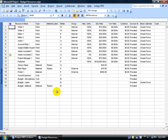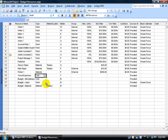Up until this point, we've only assigned cost to our work and material resources here in the Resource Sheet view, and you can see that in the Standard Rate column. All my workers are at an hourly rate, except for the publisher who's at a yearly rate. We covered in a previous training video how to enter in the cost for the cost resources — it's a variable rate on a task-per-task basis.